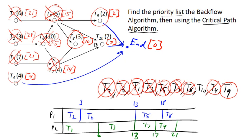So now, at time 21, task 8 gets completed, task 4 gets completed. And because task 8 is done, task 10 also becomes ready. So now we go ahead and assign tasks 10 and 9.